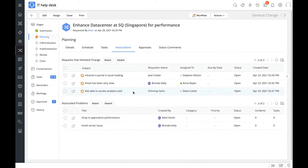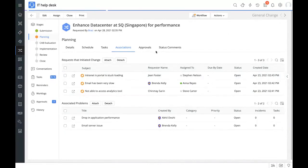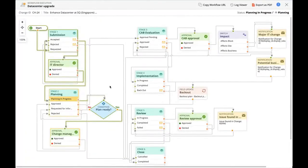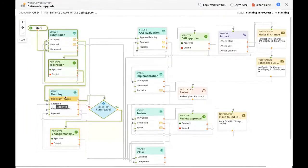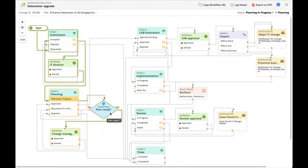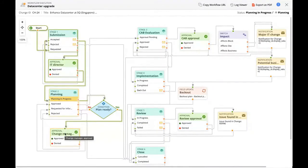Now we saw the complete details available in the planning stage. Let's see where we are in the workflow. The change request has traveled further — under the planning stage, the status is 'planning in progress' and a conditional node is activated checking if the plan is ready. We saw the complete details on impact analysis, rollout plan, and back-out plan, so yes, the plan is ready. Since the condition is yes, an approval has been triggered and the change request is now waiting for approval from the change manager.